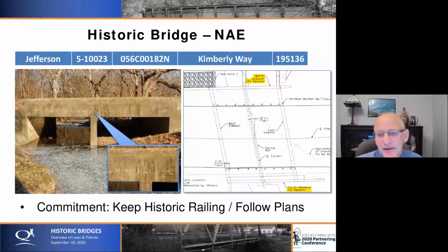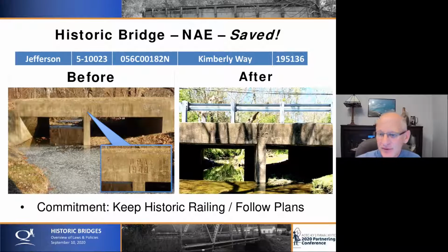And the only way we communicated that to the construction industry was a little note here: north head wall to remain, and then down at the bottom, south head wall to remain. And that was included in the plans. And then I'm happy to report that I went back out a few months later, and the bridge has been rebuilt. The deck has been poured and rebuilt, and there's new guardrail there for safety measures, as our safety people will be glad to know. And then the historic element on the outside of that bridge did indeed remain.